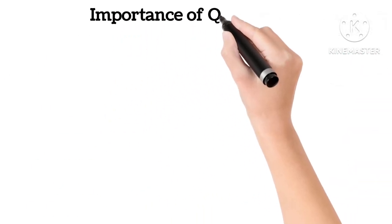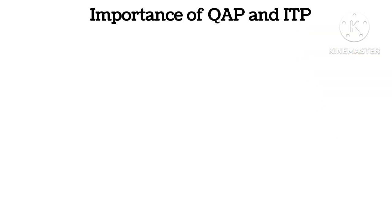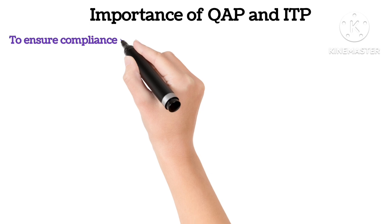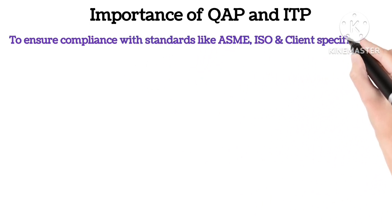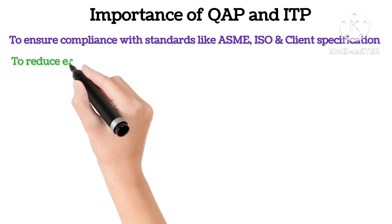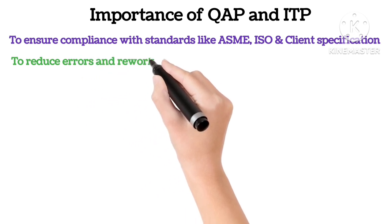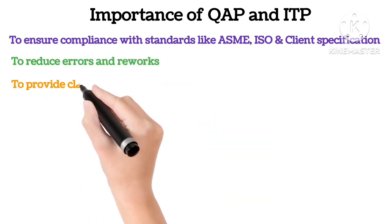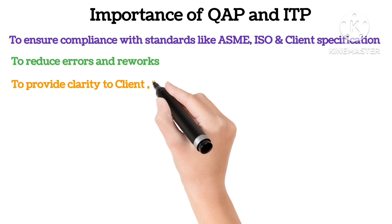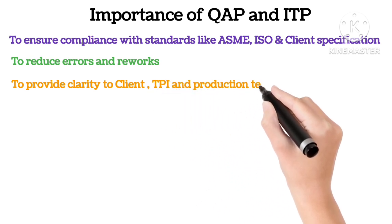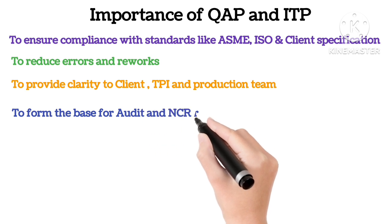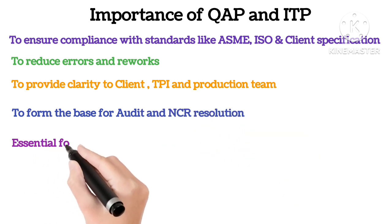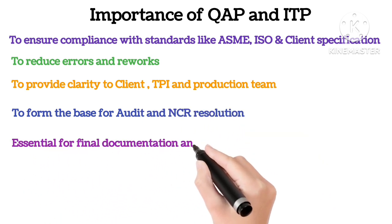Importance of QAP and ITP. Why are these documents important? To ensure compliance with standards like ASME, ISO and client specifications. To reduce errors and reworks. To provide clarity to all stakeholders — the client, third-party inspectors and the production team. To form the base of audit trails and NCR resolution. And they are essential for final documentation and project handover.